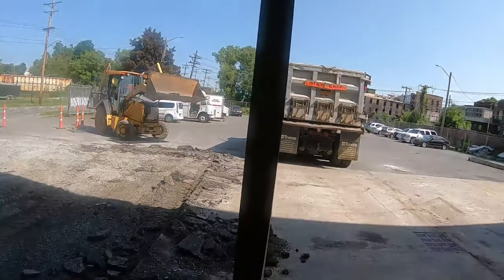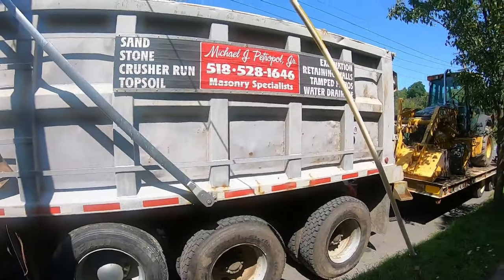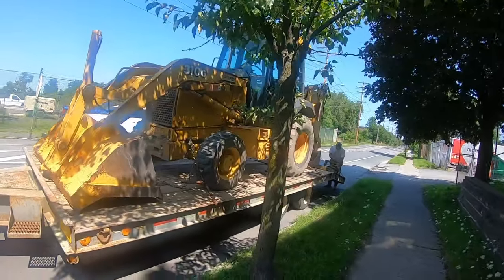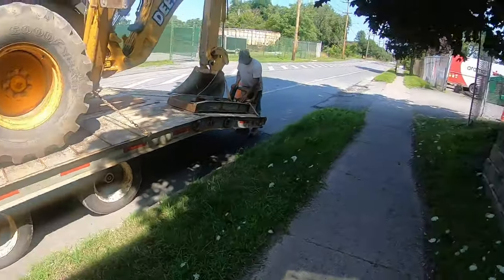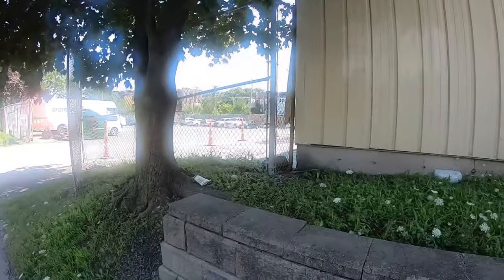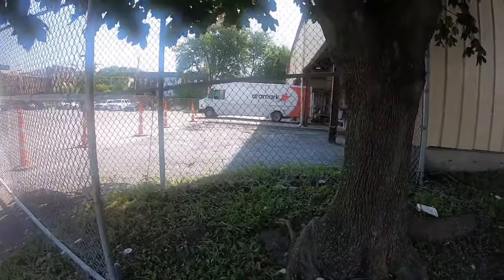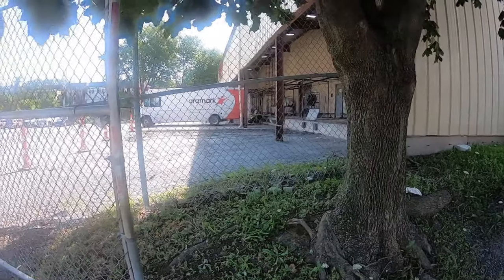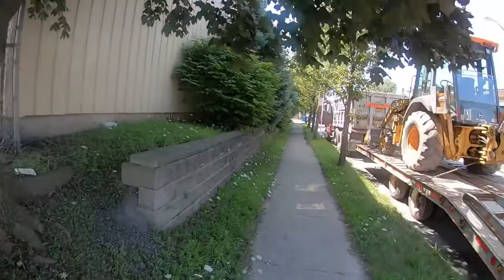Gonna continue on getting the blacktop out. We're almost full probably. And then I'll get that unloaded. Check back. All right, we got a full load of blacktop, all the blacktop's out, and the backhoe got fired. We are going to get the skid steer once we drop off this load. We'll bring back old Rusty, and we'll finish her out with that and bring some form boards. The backhoe is just hard to grade with. We got tight spots all in here, and we don't feel like raking out and shoveling as much as we have to, because we got concrete tomorrow. So we will be back.